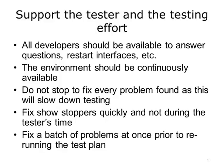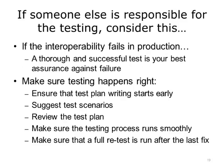Testing is a tedious process, so allow the testers to do their work efficiently by providing a stable test environment and immediate support when needed. Also, testing is more efficient when you do not stop to fix every problem found. Fix showstoppers quickly, and not during the tester's time. Fix a batch of problems at once prior to rerunning the test plan. If the interoperability fails in production, who will be blamed? A thorough and successful test is your best assurance against failure. Make sure testing happens right by ensuring that test plan writing starts early, suggesting test scenarios, reviewing the test plan, making sure the testing process runs smoothly, and making sure that a full retest is run after the last fix.